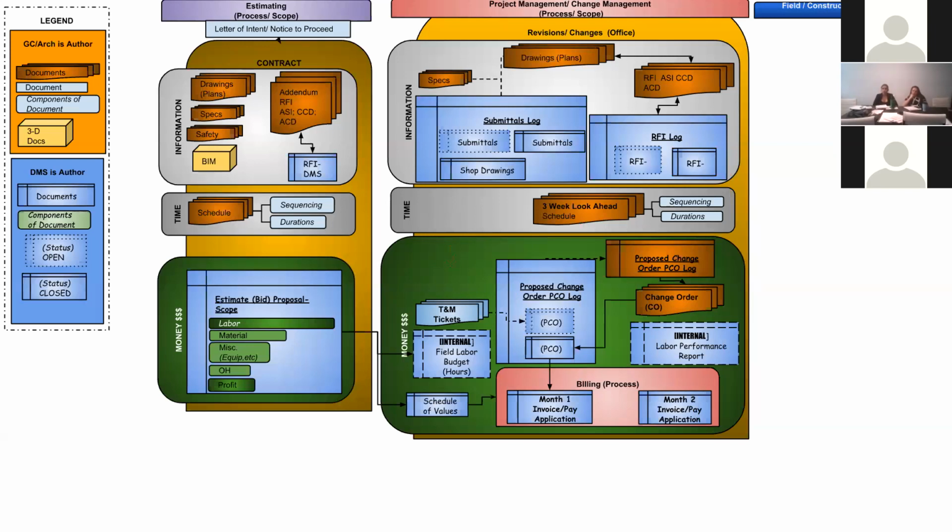The disadvantage to that is that if we estimated inaccurately or new information became available after we agreed on this, that we could not make the money that we were imagining. T&M is a little bit safer, that we're going to be more likely to receive that money. The disadvantage is we're going to be receiving less money, and it puts more of a burden on our office to maintain and push those things out.